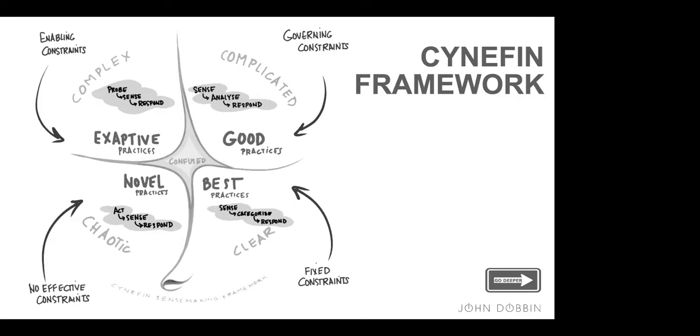And so what's happening there is that we're sensing the problem, and the problem in this case is that users are having to log on to multiple different systems. We can do an audit of our systems to make sure that they all support some form of single sign-on. And when we do, we can then implement a project. And this type of project is also very good for waterfall. It's fairly straightforward.